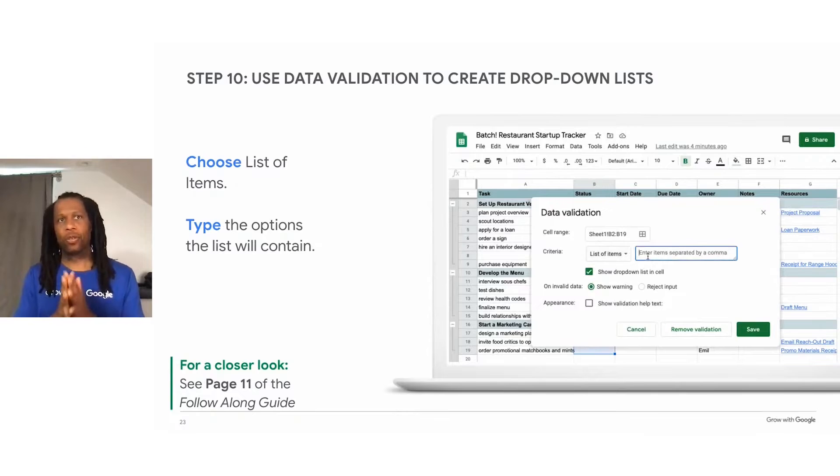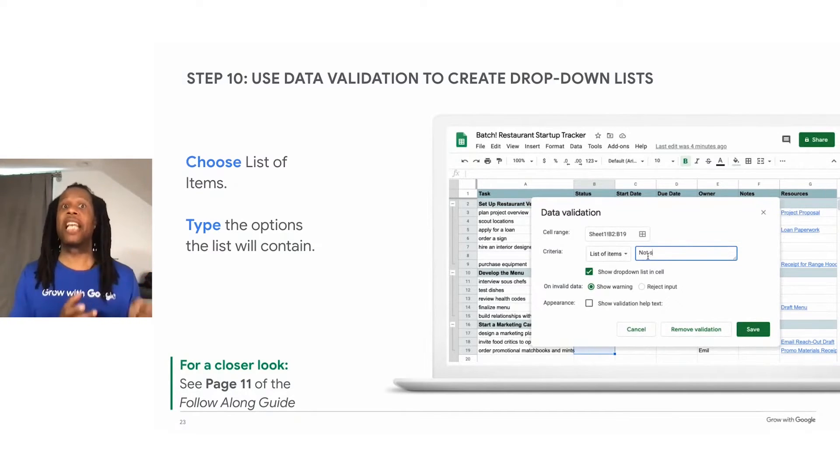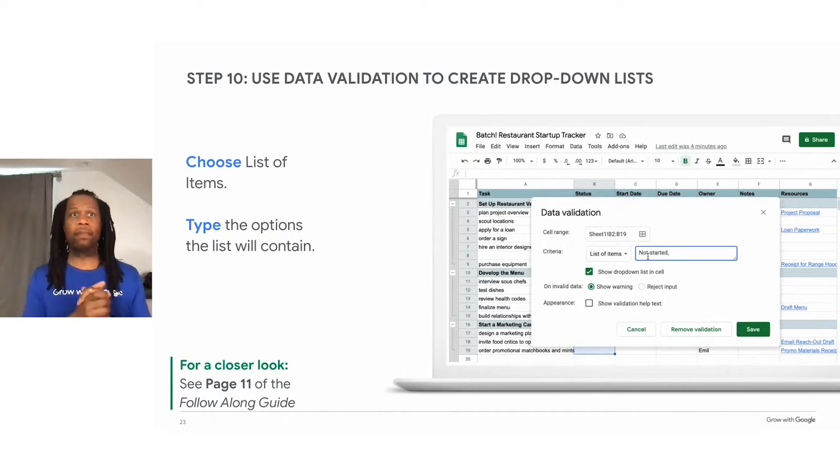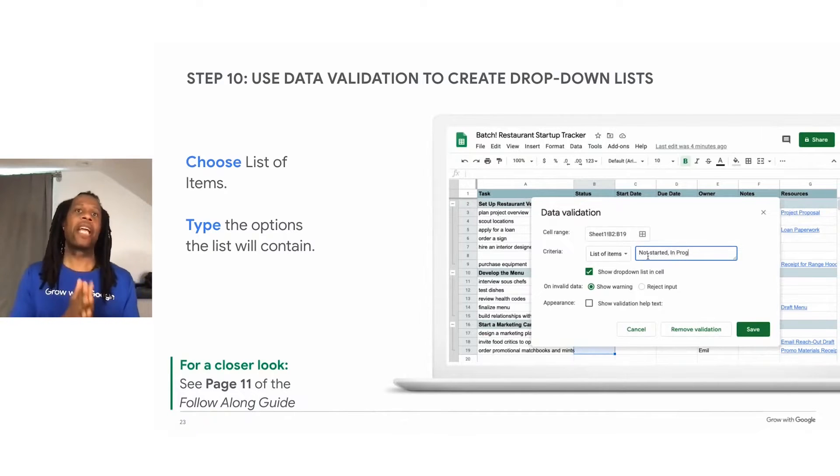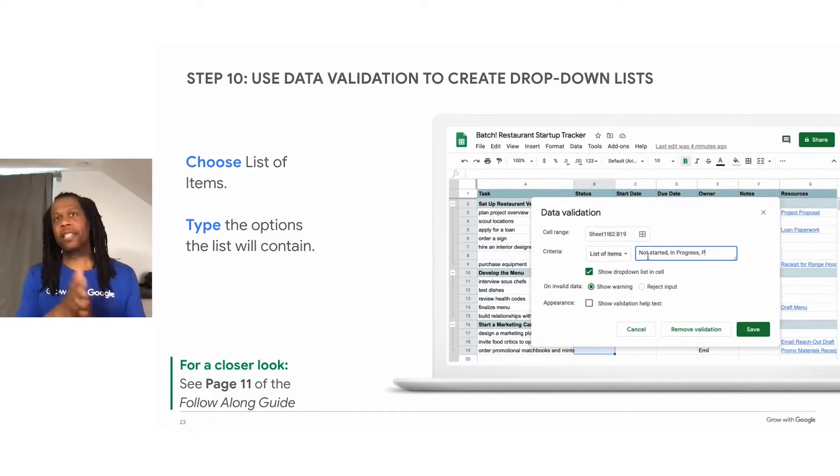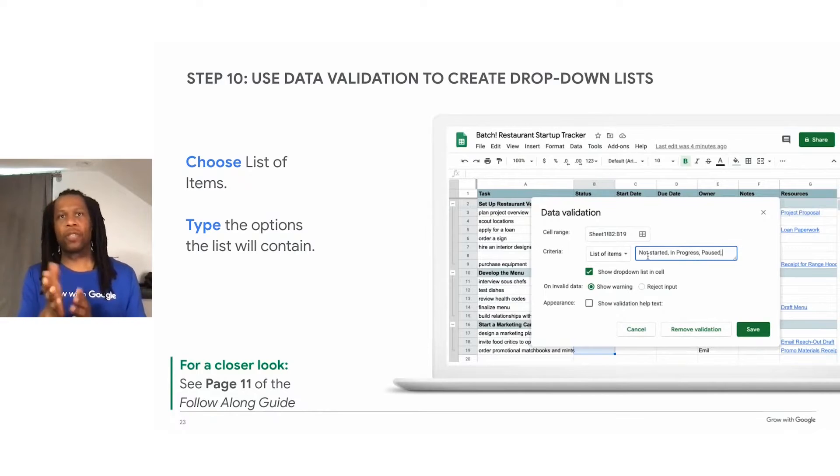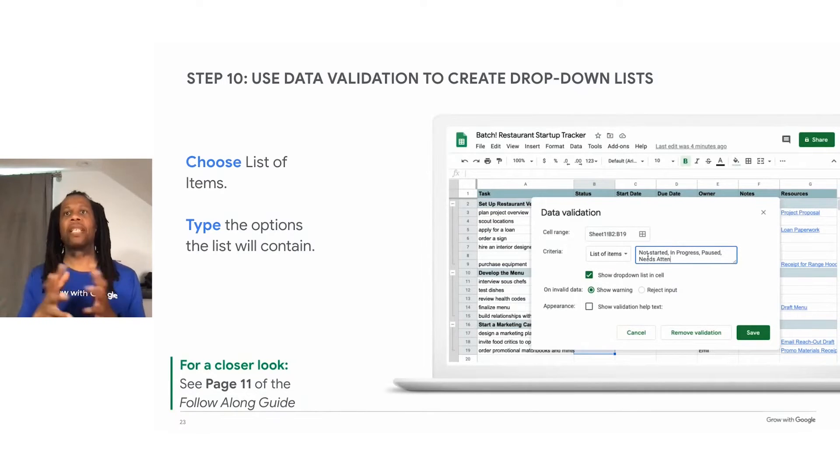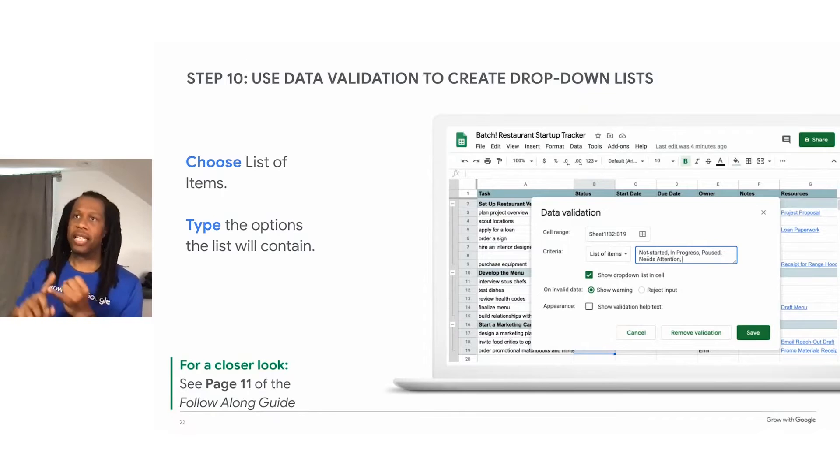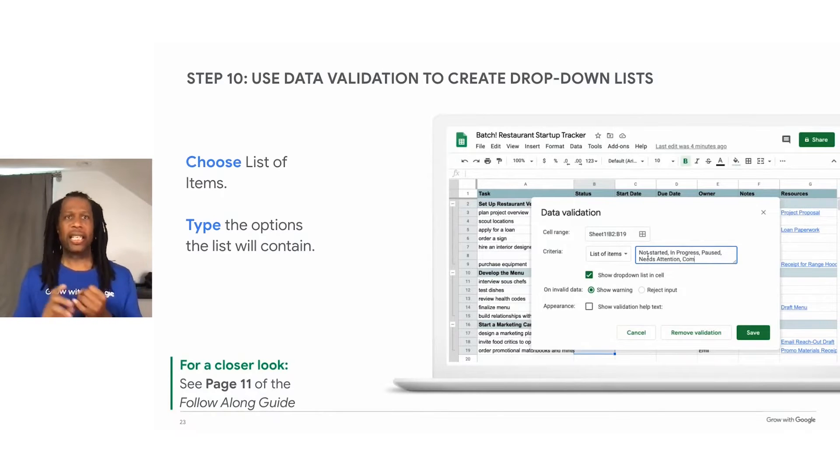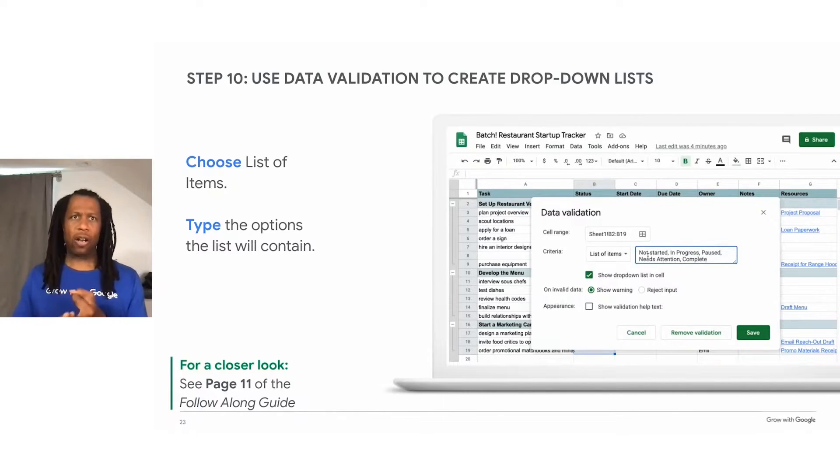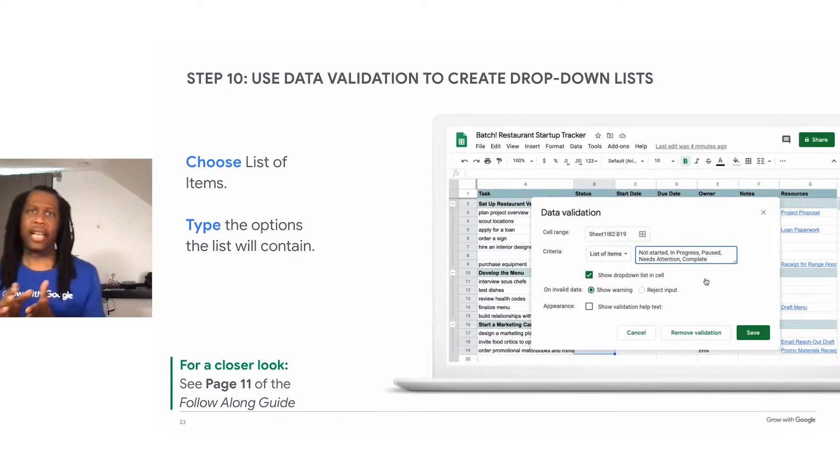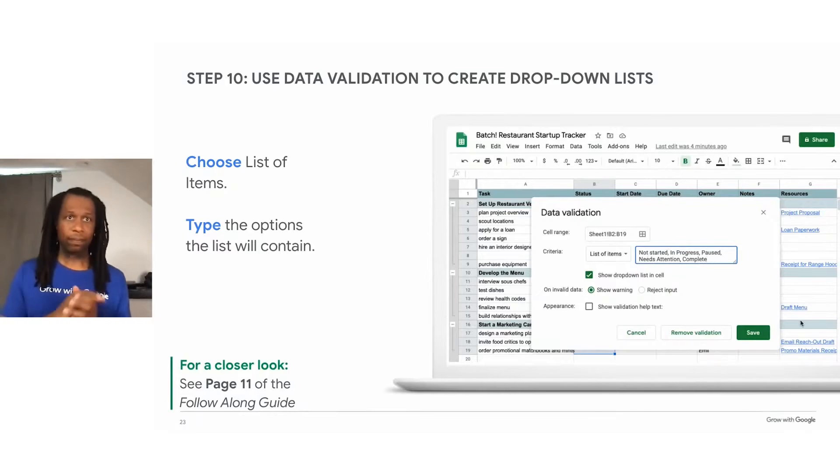So choose list of items, this is important, from the criteria menu. Then type in terms that will appear in your dropdown menu. In this case, we'll use some basic terms, just like in the animation here, to describe the status of the task. So not started, in progress, paused, needs attention, and complete.